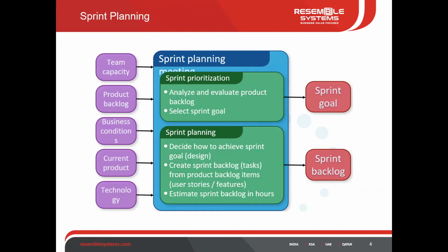So what the product manager or the Scrum team will do is come up with a plan. My goal is to roll out the initial application feature to submit a leave request. I create all the tasks for that, and I put a time frame of 2 weeks. I put together the Scrum team and set all the conditions. I will do all the analysis and roll it out. This is nothing but the sprint planning.